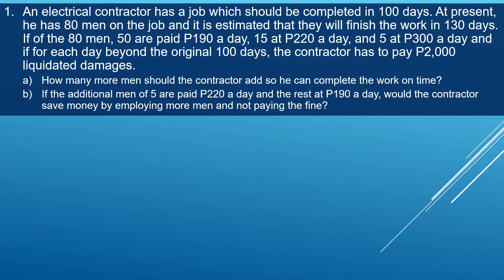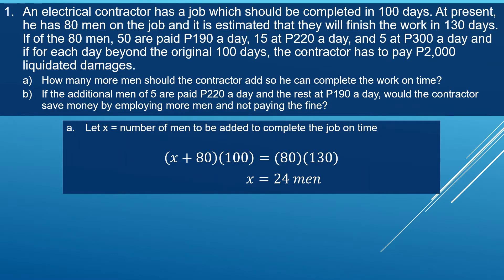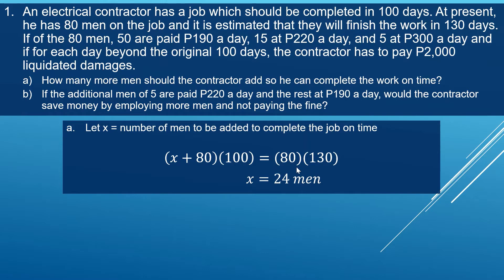To solve letter A, we let X be the number of men to be added to complete the job on time. We equate man-days: (X + 80) times 100 days equals 80 men times 130 days, since 130 days is the present estimation for 80 men to finish the job. Solving this, X is equal to 24 men. So 24 men must be added to the existing 80 men to finish the job within 100 days.